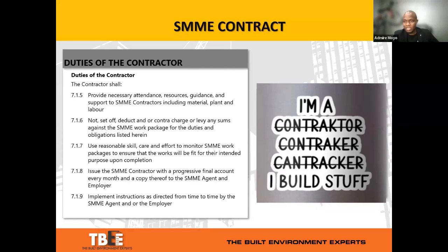What normally happens there is a disjuncture in understanding between the SMME and the contractor, because the SMME is of the view that they've done their part, they just need to be paid whatever is reflected on their bills or their work package. And the contractor is of the view that, but you've used my scaffolding, which I could have used elsewhere. There's the contract charge and so on, and that then leads to all sorts of nasty engagements between the parties.